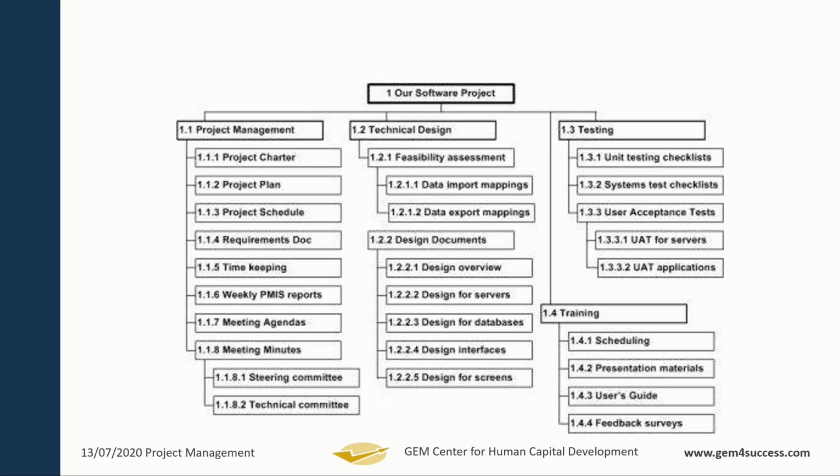So the project management aspect is further decomposed into 8, and then one of those 8 is further decomposed into 2, and so that's how the decomposition goes round. You can also note something about how those boxes are labeled. The main one on top, you have 1, which could be 1.0, and then 1.0 is decomposed into 1.1, 1.2, 1.3, and 1.4.